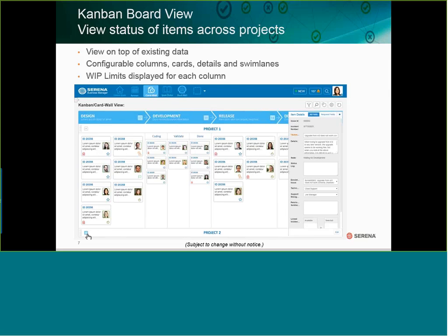And that same thing is now being applied for software and process management, where they've got an electronic Kanban board view, which allows you to emulate electronically that whiteboard. Items are displayed as cards or Post-it notes, and they move along the process, with the columns representing status.